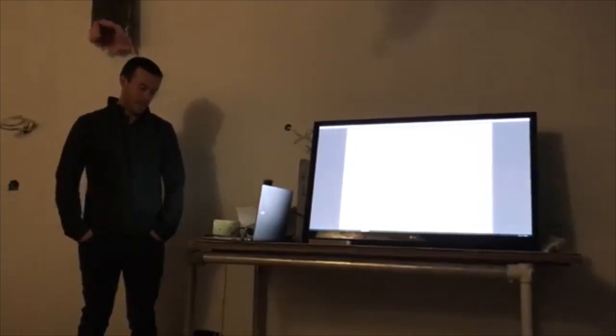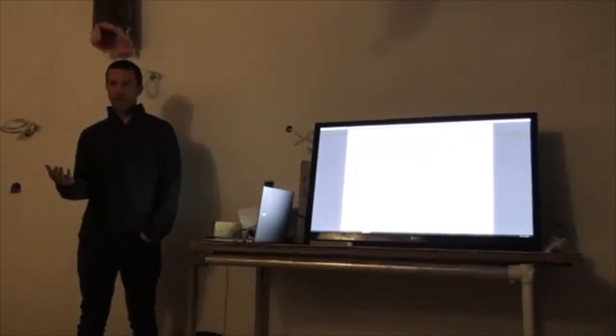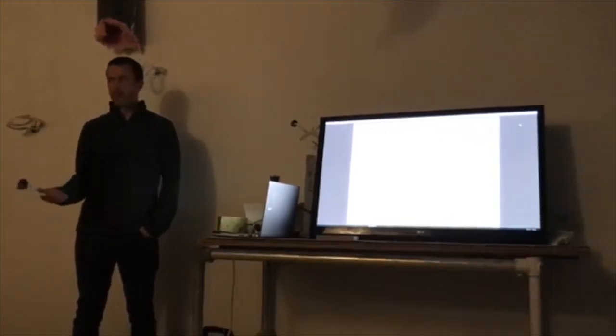And time and expense. So again, leading back to an approach where you introduce units incrementally, adding 1 unit at a time, it could take a bit more time to do basically 2 renovations to get to 3 units. And there's the cost of carrying the property that is a factor, and the cost of development charges, which is also a factor. So those are the most obvious challenges.